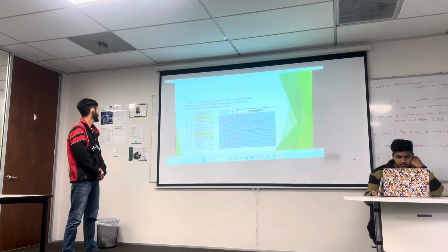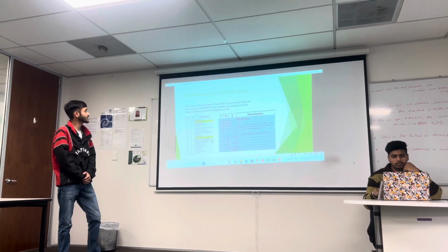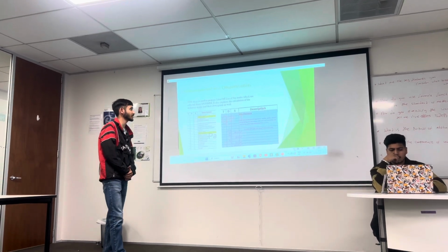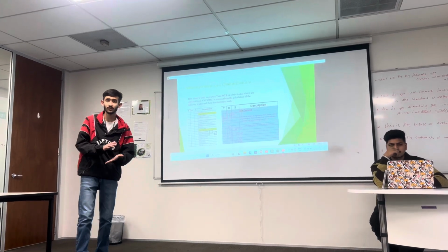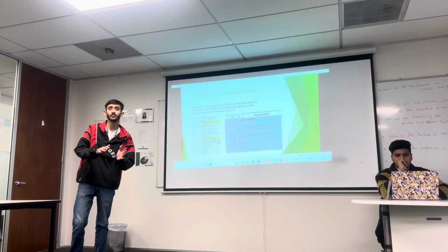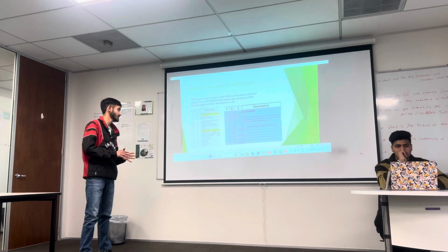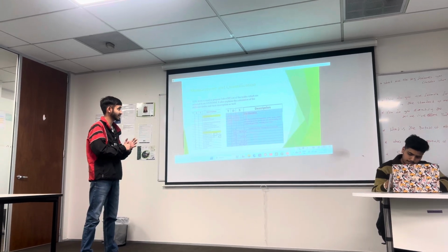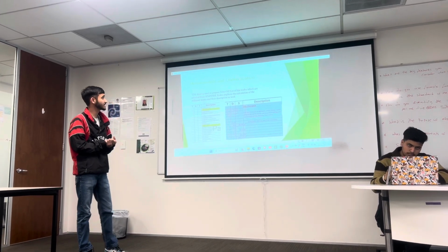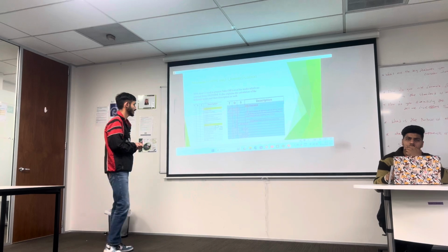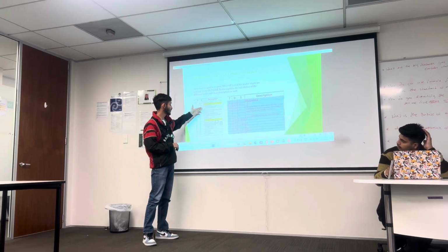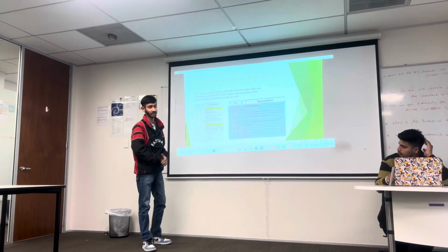And what are measurement and quantification? A TDS sheet is used to prepare a take-off list. A take-off list means the to-do list of the types of trades we are going to perform in any construction work, which are selected from ANZ SMM. It also explains the calculation of the different trades and their descriptions as well. Here are some to-do lists from groundwork to excavation to the concrete work.